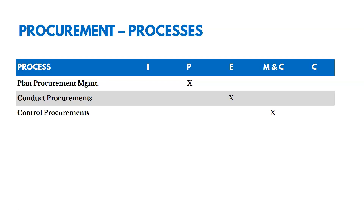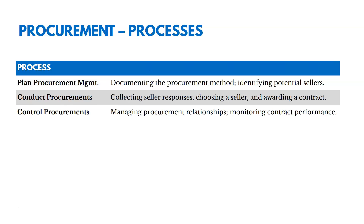There are three processes in this chapter: one in planning, one in executing, and another in monitoring and controlling. With Plan Procurement Management, we're documenting our procurement method — how we're going to get the things we need from outside vendors — and identifying potential sellers. Then we conduct procurements, collecting seller responses about cost and timeline, choosing a seller, and awarding a contract. In Control Procurements, we monitor procurement relationships and track contract performance.